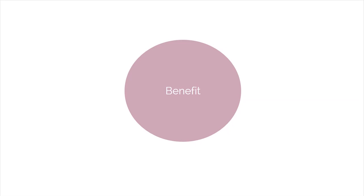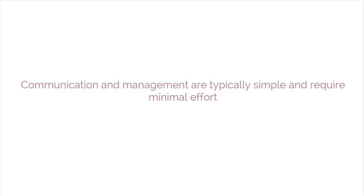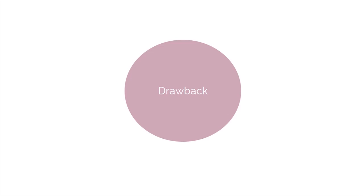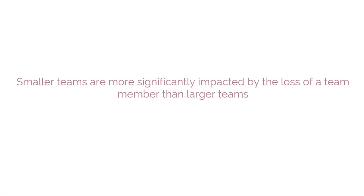A key benefit of a 6–10 member team is that communication and management are typically simple and require minimal effort. However, there may also be drawbacks. One major drawback is that smaller teams are more significantly impacted by the loss of a team member than larger teams, even for a short period of time.